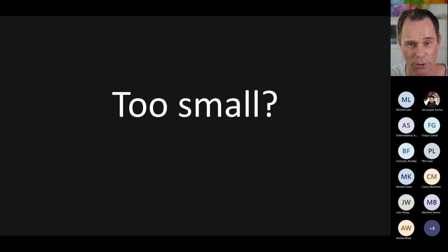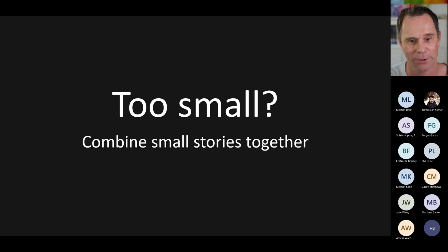Requirements that are too small have just too much management overhead relative to the value. Adding a column, changing the color of a button, just wrap all those up, combine those into bigger user stories so that they're at least a 1 or 2 points, a couple of hours of work where we can justify releasing them.